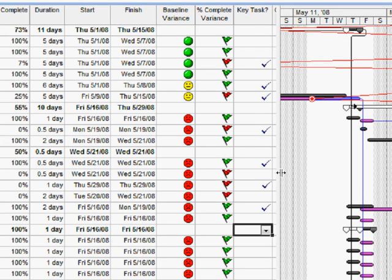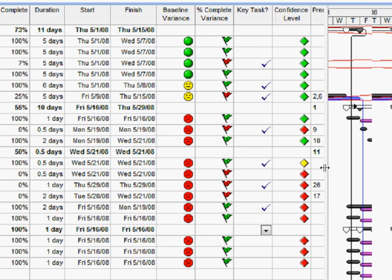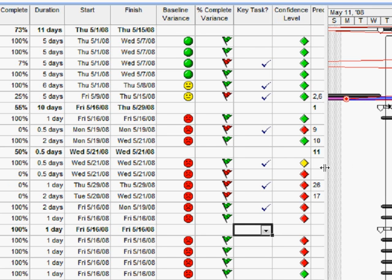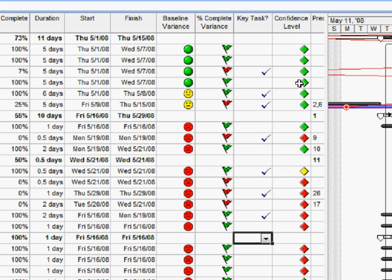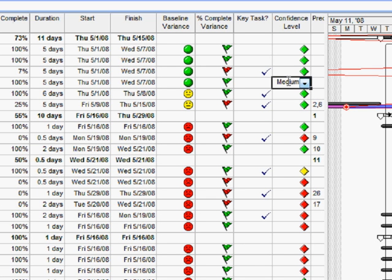One other type of indicator here that I'd like to show you before we see how we create them. This one here is a confidence level indicator. Again a project manager can go in and set their assessment of their confidence on that task. Let's make this one medium confidence as opposed to high.